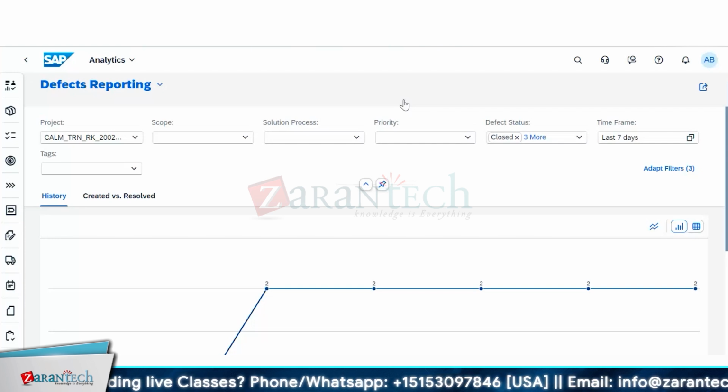If the defect count is not zero, you still can go ahead, as you would have seen in your project: even with the production go-live, we go with some defects into hypercare. But as standard practice it should be zero, or at least there should be no major defect still open which will hinder the go/no-go decision.